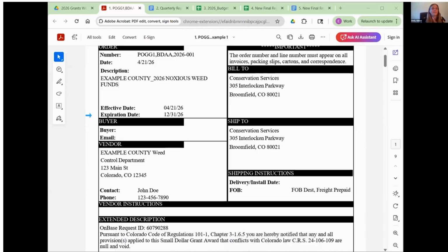Yeah, expiration date. We will cover the specifics of the deliverables for this grant. Keep in mind these deliverables are due by this expiration date. If for whatever reason the project runs into delays, we are able to process extensions. However, we do ask for at least 1 month notice in the grantee's plan to request one. This gives us enough time to get the paperwork updated before the current window closes.